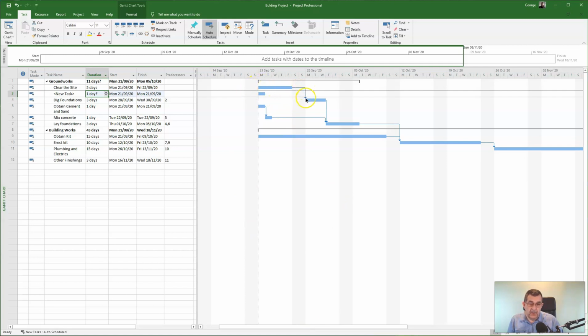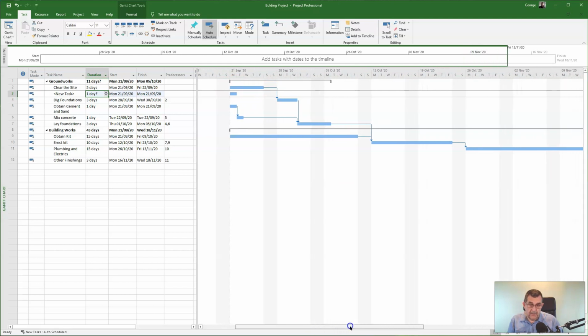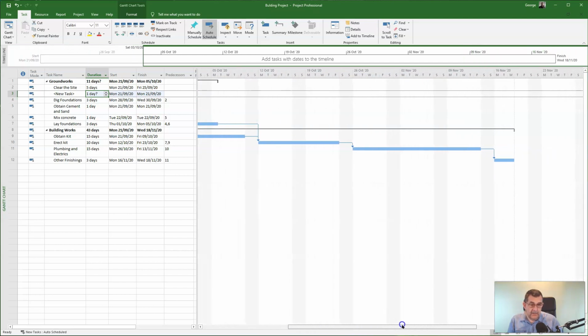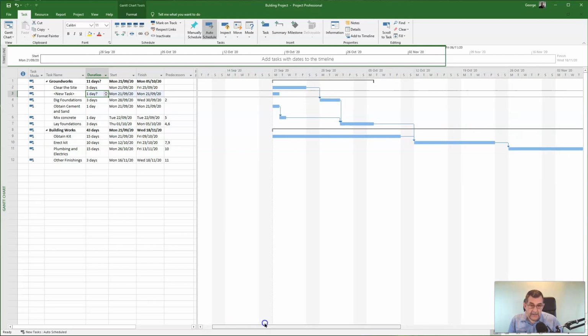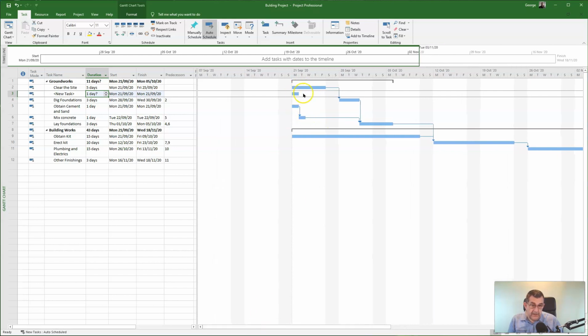If you look at your Gantt chart, and we'll have a quick look at this one just now, I'll scroll it across, you'll see that everything is actually linked up together. All tasks except those that are starting on day 1 will have a line coming out of them going to another task. So they'll always have an arrow coming into them, or 2 arrows depending on whether the task can be done concurrently with something else. Notice how all these are linked together quite nicely. If I saw this one here, I would say, oh wait a minute, we've got a problem here. It might be starting on this day, but it's not linked to anything, so there's definitely something wrong.